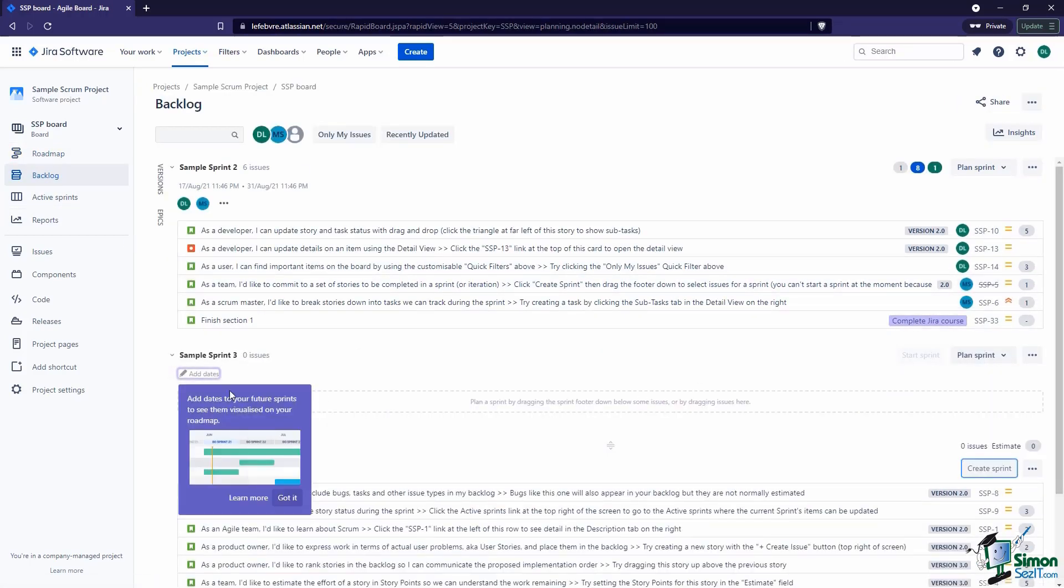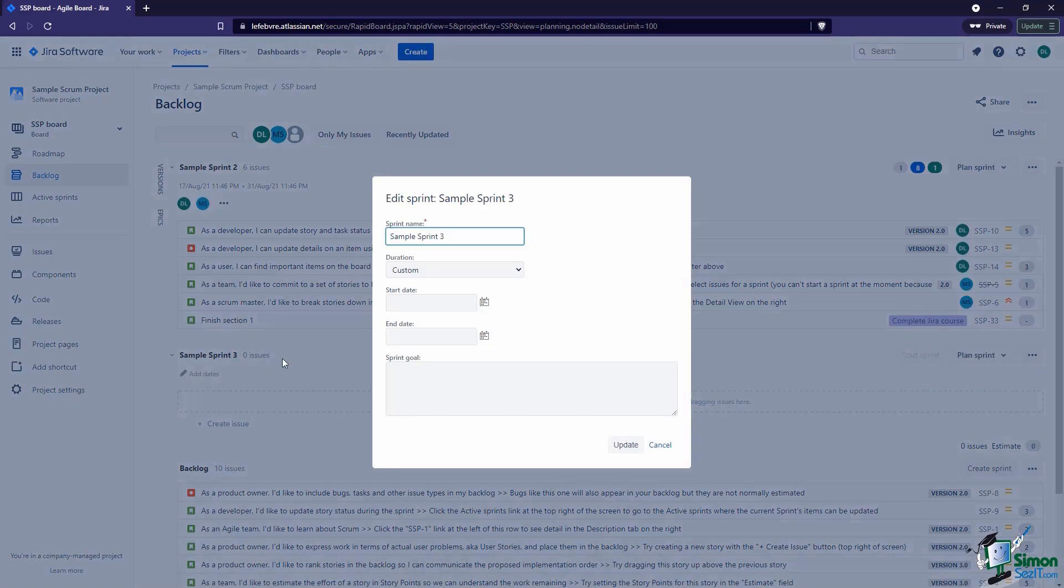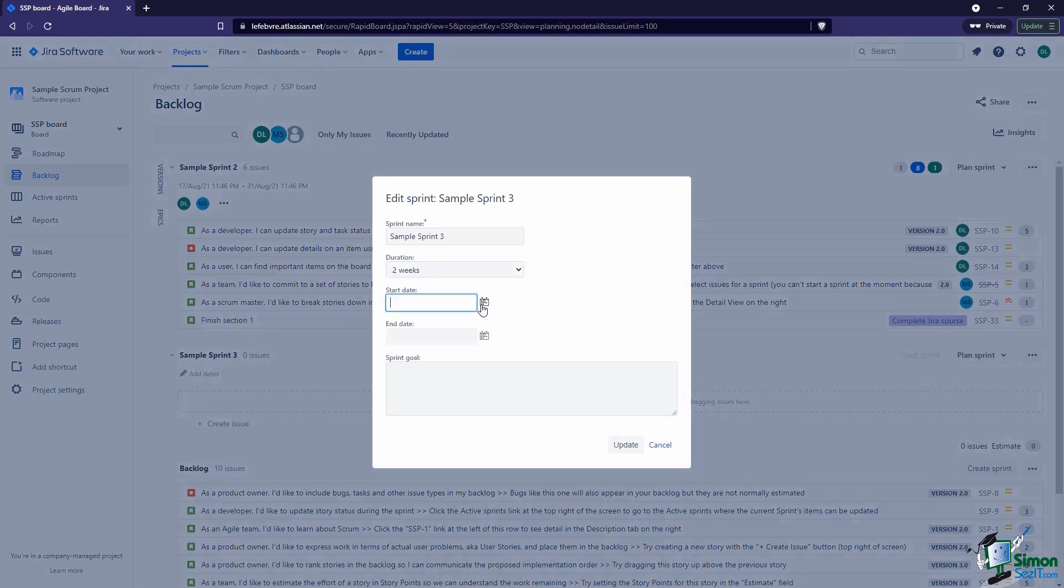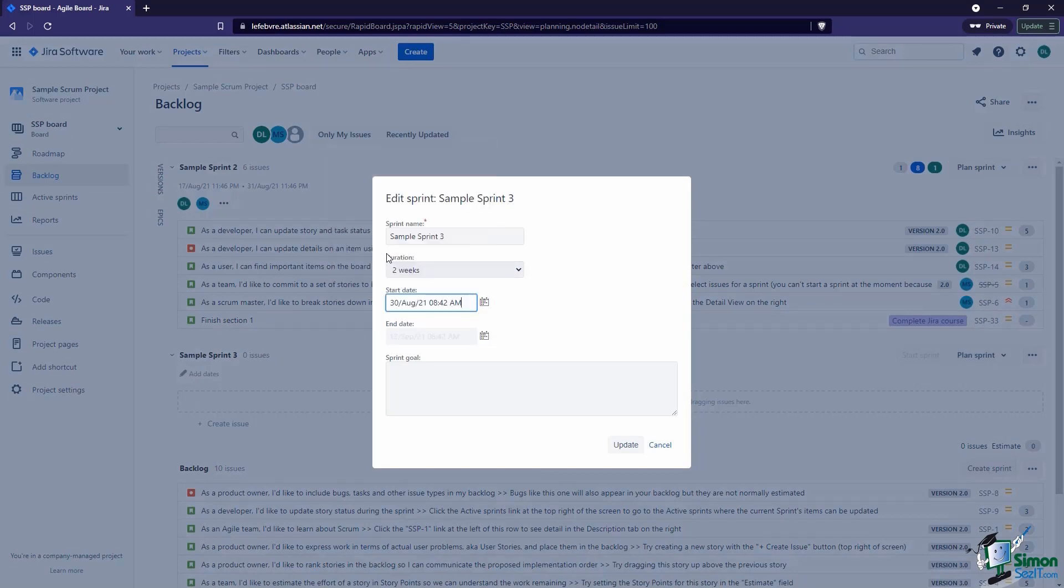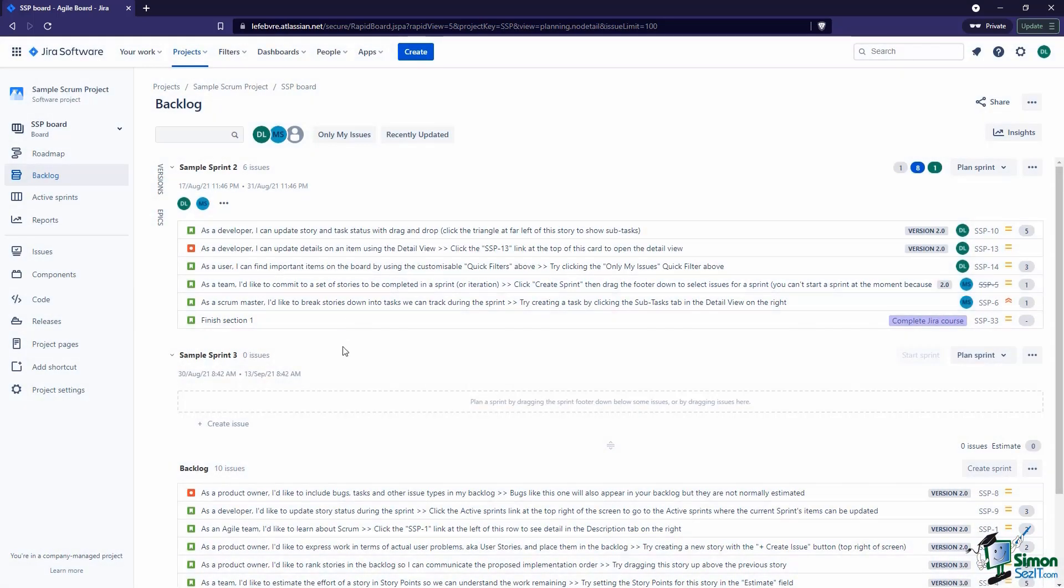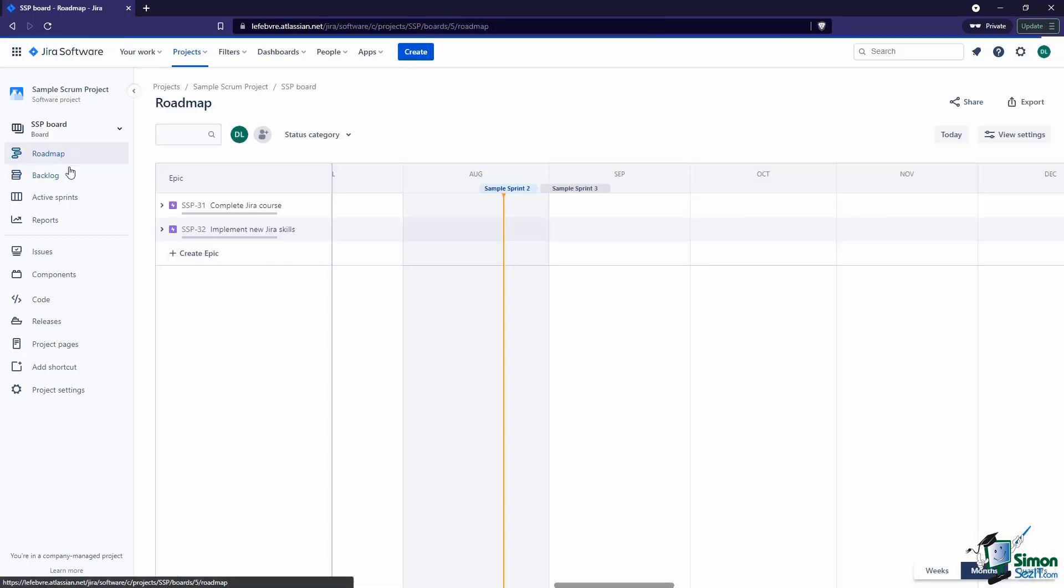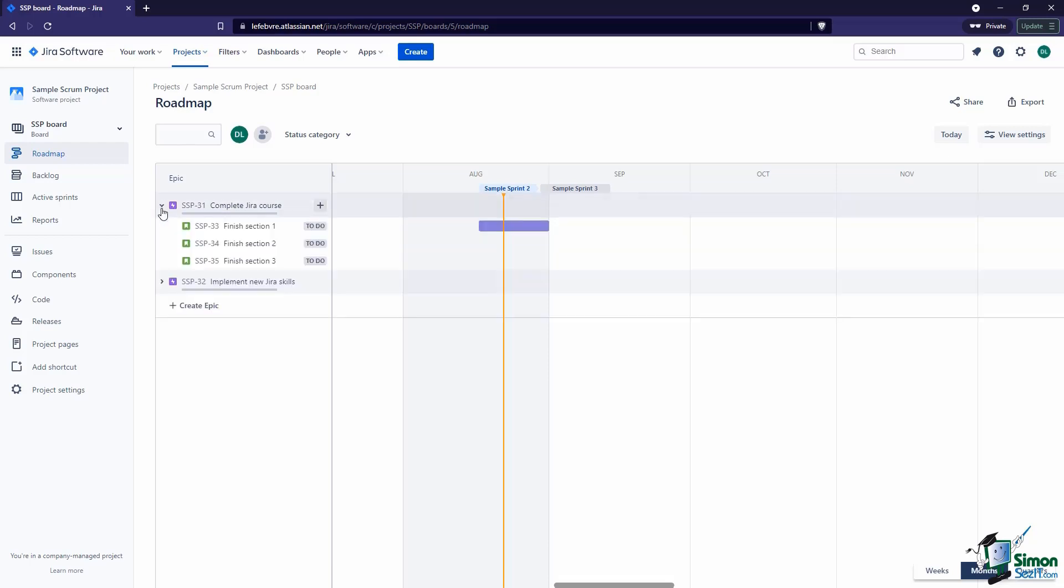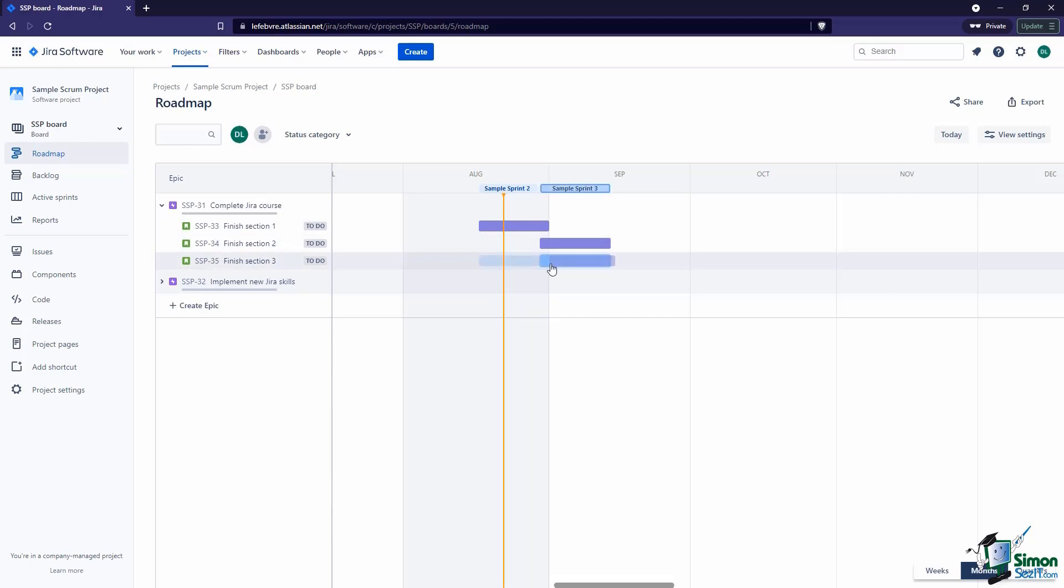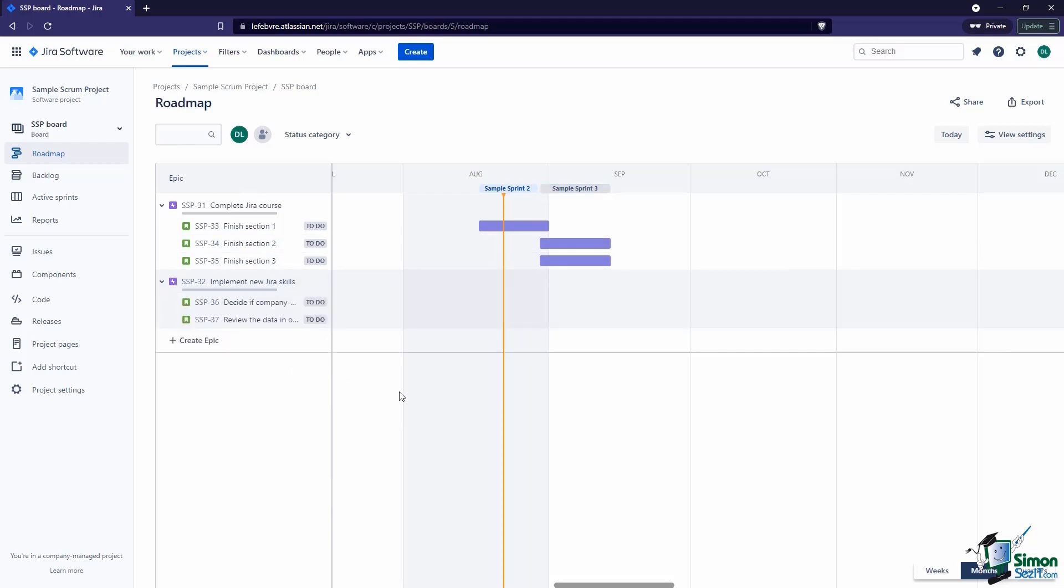It doesn't have to be active, but we could add in a future one. Let's say we're going to start this one on the 30th and then have it be two weeks. Let's update that. So now if we come into our Roadmap, we'll see that on our roadmap. Now we can say, okay, we'll finish Section 1 in this sprint, finish Section 2 in this one here, maybe Section 3 as well. You can start to see how we can start to organize these things in the future.